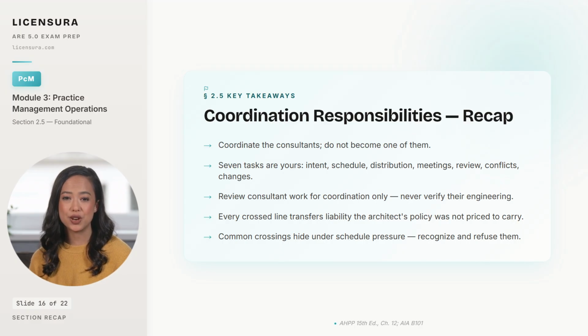Third, when you review a consultant's work, you are checking for design coordination, not verifying the engineering, because verifying it transfers responsibility you were not paid to take. Fourth, every crossing of the line transfers liability from the consultant's policy onto yours, and your policy was not priced to carry engineering risk. And fifth, the crossings almost always happen under schedule pressure.